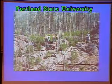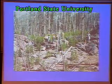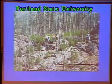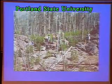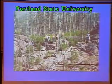And I forgot to mention, with the archaeological resources, those people also take care of the consultation with the state historic preservation offices, and the biologists work with the Fish and Wildlife Service or National Marine Fisheries Service to get approvals and coordinate with those agencies to make sure that we're following their procedures and get clearance from them to make sure that we're following the laws.